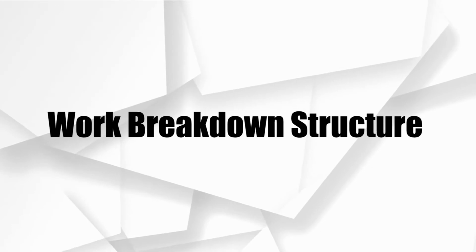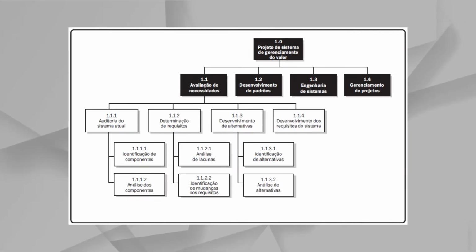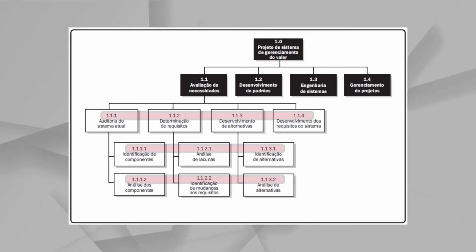Work breakdown structure. To get each phase done, to be executed, you must plan it. You must break the requirements in context and dependencies to plan it. One of the ways to do it is assigning tasks to the teams, making use of another structure called Work Breakdown Structure, or WBS. It will place each task in groups and hierarchical sequence, assigning unique IDs to each task and group, in a way that once you define the dependencies and relation for each task, you can determine with a good level of precision how much time your project will take.